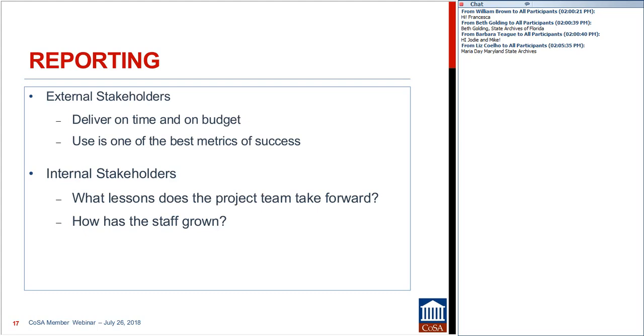What do we know now about what it takes to do this kind of work, how much time, what the resources are, where the possible bottlenecks are, and also to assess what we have learned skill-wise from the project, so that everyone has a sense of what the work on the project has added to their day-to-day ability to do their jobs and to fit into the organization and the profession, and how you and the staff and the project as a whole have grown through the period of performance and hopefully in the successful execution of the deliverables.